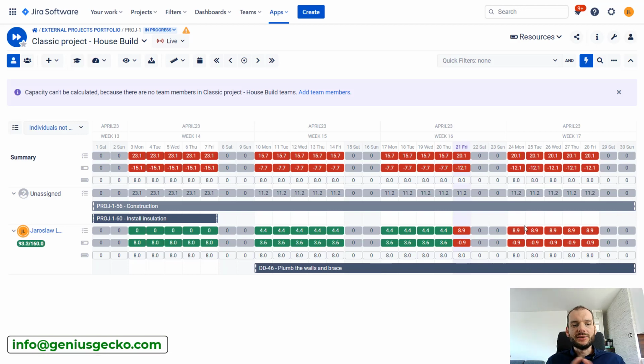So you can see that from day to day this number will change, and I will simulate the change of a date by moving the issue in a moment. And you will see that the numbers over here change. So if we would have more days in the future planned, I will move the task around to simulate, you know, the flow of time. And let's say that still no work was logged, but we should be further on the timeline in execution of the task. These numbers will change. So we have the same remaining estimate divided over a smaller amount of days.